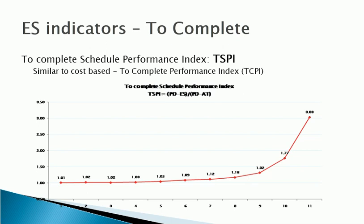The project manager has a few options: one is to have the project team work more efficiently for the remaining time; the other option is re-estimating and re-baselining to increase project duration, which will also increase cost.